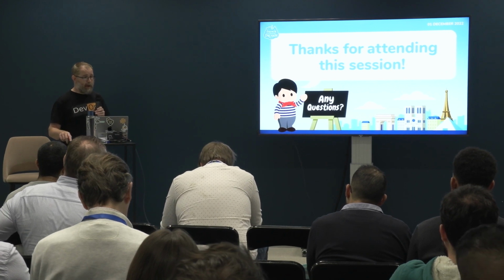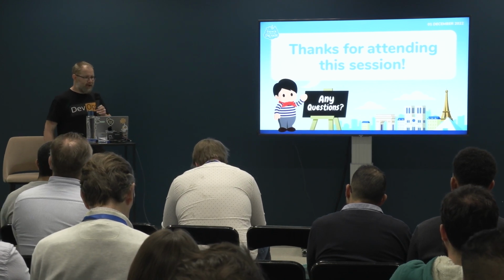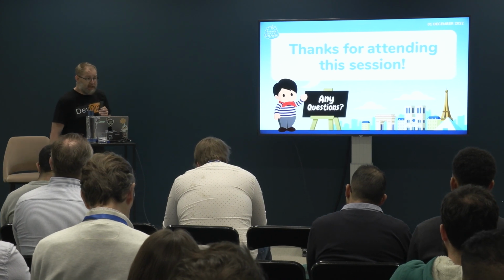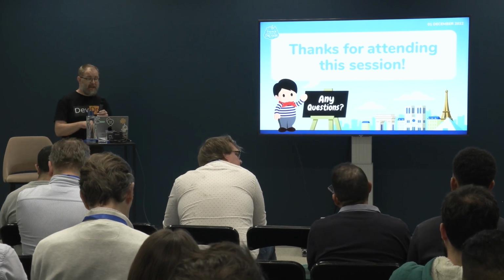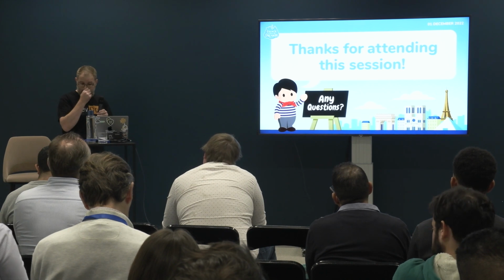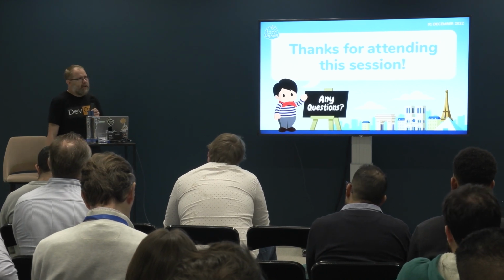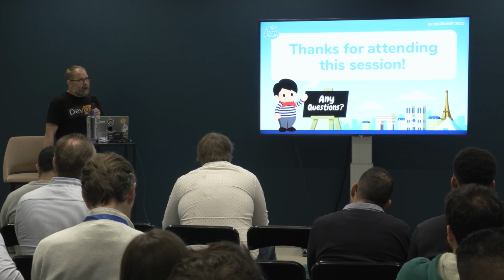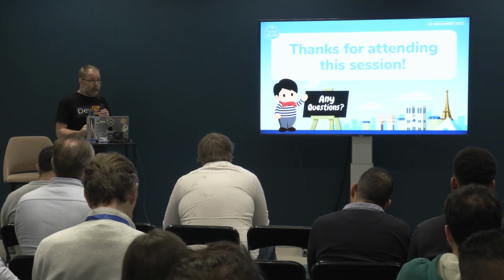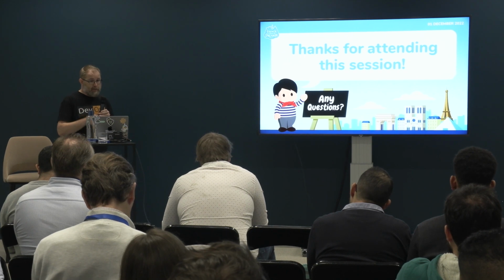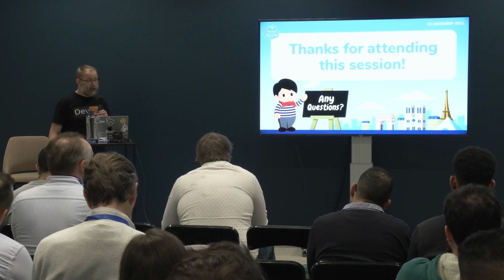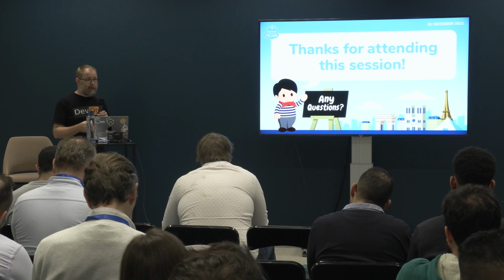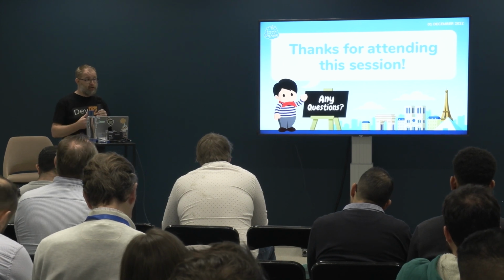I'm not suggesting that folks are going rogue in your team, but from a technical standpoint, that's how it can happen. So the biggest takeaway I would suggest is to start looking at breaking work up into smaller chunks and push it in early and often. Okay? Because that gives the branches less opportunity to drift apart.